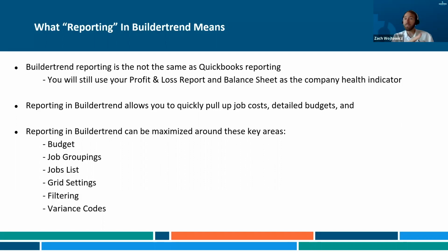So going back to that job type that we just discussed, I want to see my kitchens and I want to look at my budget. Now I can see all the variance additions, or excuse me, variance expenses separated from my actual expected expenses, and see this project had 3-4% variance. Think about how powerful that is.